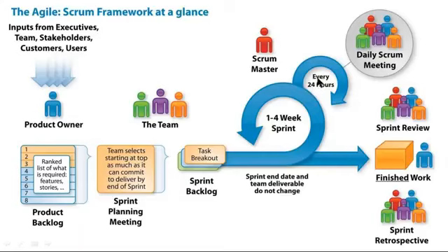And daily, 24 hours means what? Daily, you attend the daily Scrum meeting, which is conducted by your Scrum master. He'll be controlling the whole team. And before we finish the work, we have to review. We have to give some presentation to your owners, or anybody can attend that meeting, no problem. If they're okay with that, then we finish the work and release the product to the customer. And again, lastly, we go for the sprint retrospective meeting, and we'll have a discussion on improvement, what things went wrong, what things went well, and all that discussion will happen. Again, we'll come back to the product backlog and we'll start the second sprint. This is a cyclic process. It goes on following the cycle. It's a simple process, very simple.